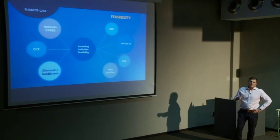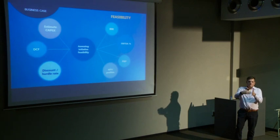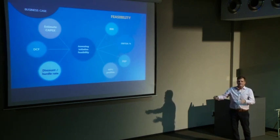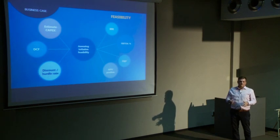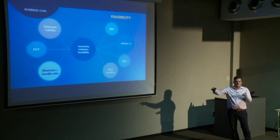so the IRR is your rate of return. And that's worked out by your discounted cash flow, and the year one investment is your CapEx. The year one is CapEx, which is the outflow, and the discounted cash flows, or what's the cash profit expected from that initiative every year. But the discount hurdle is how you work out the discounted cash flows, because it's the time value of money, because R1 million today is probably only worth 800,000 in 5 years. So you can't say you're going to get R1 million a year, because the value of the money decreases.